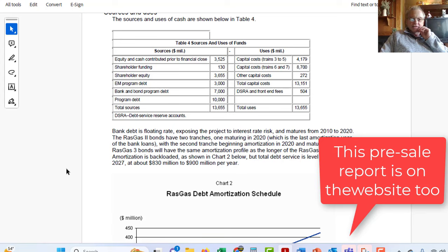Now, if you did a break-even oil price, what you could decide to do was, well, should we look at the DSCR or the PLCR? In this case, there could have been some extra life at the end, so maybe that should have really been the LLCR. I'm going to change the LLCR. Okay, and then we can push the oil price down. Let's push the oil price down until we get a DSCR of 1. Now, that's not very good. But the DSCR 1 is somewhere around here, and we've got all this extra thing, so maybe we should push it down until we get a...